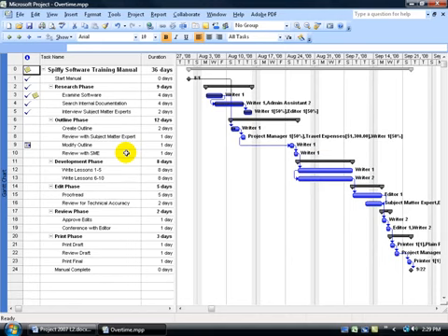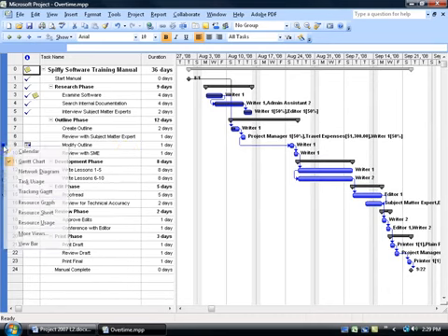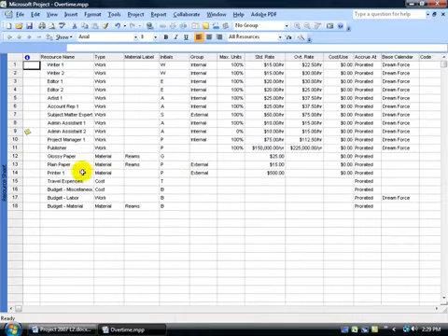So how much is that going to cost you to assign, let's say, one resource working on a task, one overtime hour? Well, again, back in the Level 1 training video, we set up our resources in the resource sheet view. Let's go over here and right-click on our collapse view bar and go down to the resource sheet view. There's a list of all the resources, how much they charge an hour or how much they cost an hour, and then of course over here we have our overtime rate, which if you haven't set up, go ahead and do so. It doesn't automatically calculate it for you, you'll just have to punch it in over here.